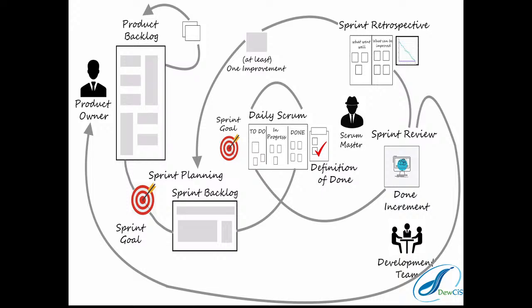because maybe you'd have also people who you know. Secondly, now create a page for the business. Once you create the page for the business, another task would be adding the details, getting some photos. So those would be then individual tasks. So come Monday, you'd pick in task number one, put it in progress. When it's finished, it goes to done. So you'd only pick the sprint backlog, the only items that within the Scrum you'd be able to do, and then do that within the Scrum.